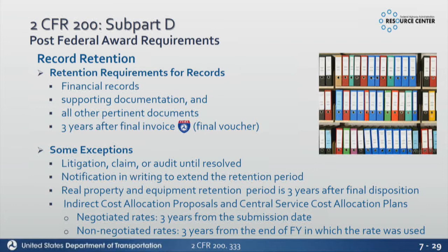Then indirect costs, you guys don't use that here, but basically if it's a negotiated rate, you have to keep it for 3 years after you submit it. If it's a non-negotiated rate, it's 3 years from the end of the year in which the rate was used.